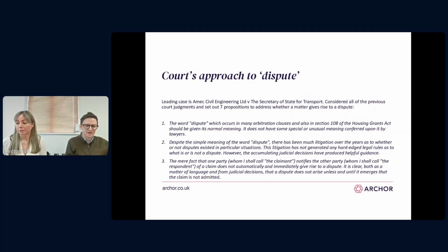They might sort of dance around it and not use the word reject, but ultimately you can tell by correspondence it's not accepted, or they might just be silent. So you might make a claim for loss and expense, say, you don't hear anything for 3 months, so you can infer that there's a dispute.